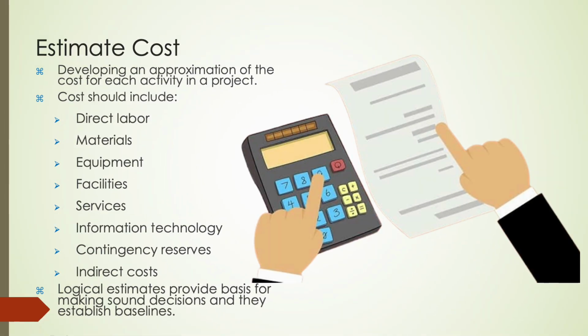Once the costs have been determined and aggregated, we move into determining the budget. This process involves several key activities. First, we define the cost baseline. This baseline is the approved, time-phased budget used to measure project performance. We identify and set contingency reserves for known risks and management reserves for unknown risks. We ensure that all necessary funding requirements are included.